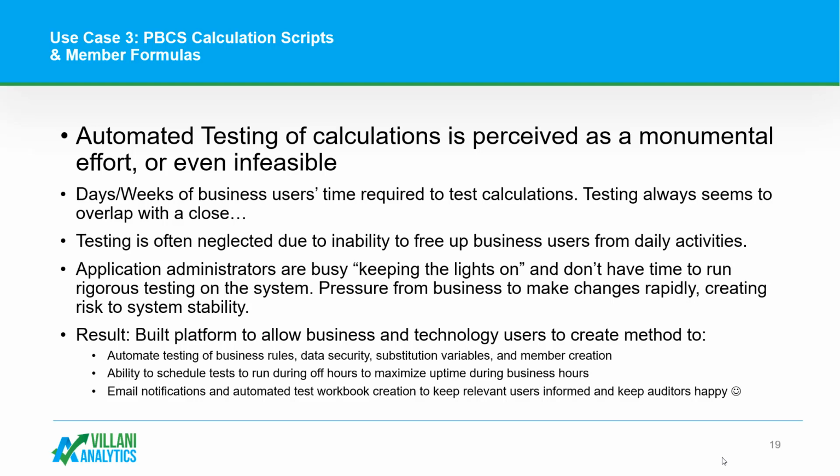And no matter how much you try to plan it out, it just always happens, or maybe it's just me, where it always seems to overlap the testing phase of a project with the close, and getting people's ability to commit to testing usually falls apart when you start overlapping with close activities.